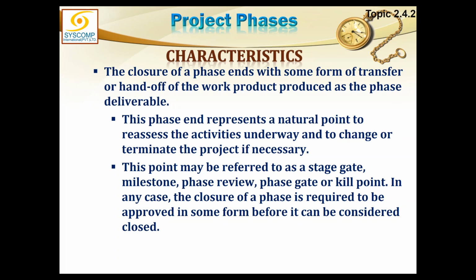As I gave an example yesterday, it might be possible that looking at the result of phase 1, management decides that this is no good work and we don't have to continue with this project anymore, and the project may be terminated at this point. Or maybe work was well done, but management thinks they don't have any more funds to go into the next phase, so they can stop, terminate, or end the project at this stage. So a phase end is a natural reassessment point, not only for the project manager for the catharsis, but also for the top level management or senior management to decide on the fate of the project.